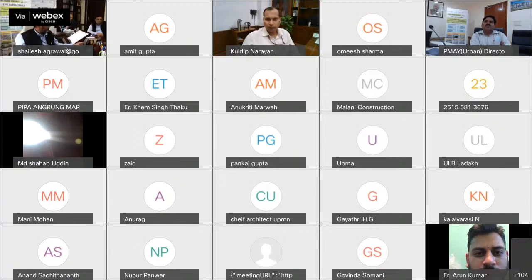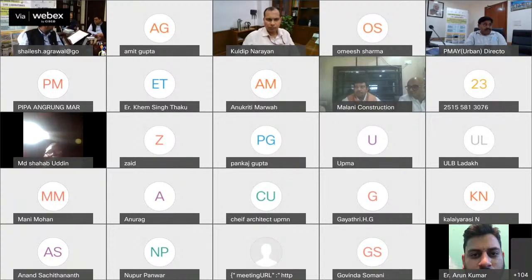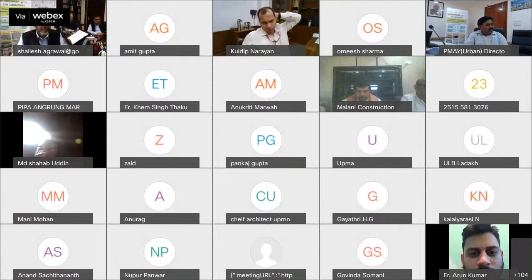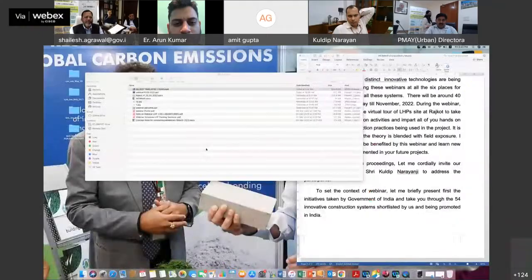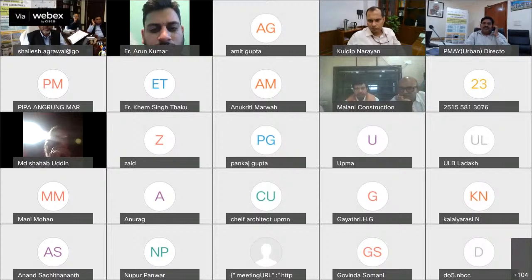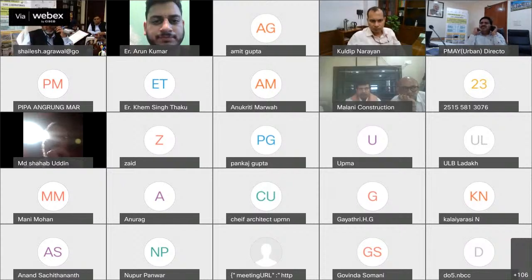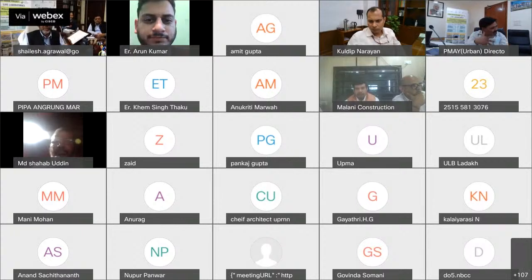The sequence of construction includes stripping of the formwork on the previous day, its positioning for the current day phase with the installation of electrical and plumbing services, placement of the reinforcement for the wall and slabs, and then concreting. Construction of LHP Rajkot was started with excavation of site, mostly rocky, and removing the boulders and soil, followed by laying of plain cement concrete, footing work, shear wall, casting of plinth beam, and backfilling to complete the substructure. As the substructure was completed in a tower, superstructure work was started by placing customized two set of tunnel form simultaneously with reinforcement and placement of service pipes as per the design, and then pouring concrete to complete one floor in a day. Following the same process, casting of 8 out of 11 towers have already been completed, and works on shell of remaining 3 towers are in different stages.